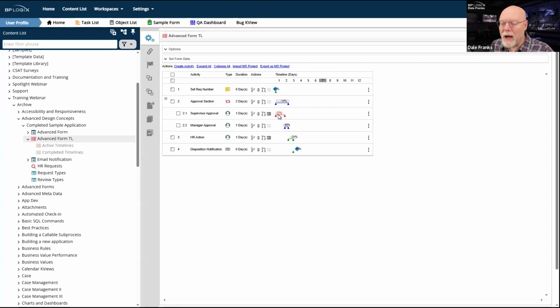Of course, if I go down to the next line, now I see these bars in red, and I note that this bar is extending beyond the little gray configuration bar. So this is configured for 1 day. However, it's going a little long. It is taking 1.3 days on average to complete. It's 27% slower than I would like it to be. All right, well, that kind of nudges it over into the red. I said that this would take a day. It's actually taking on average 1.3 days.